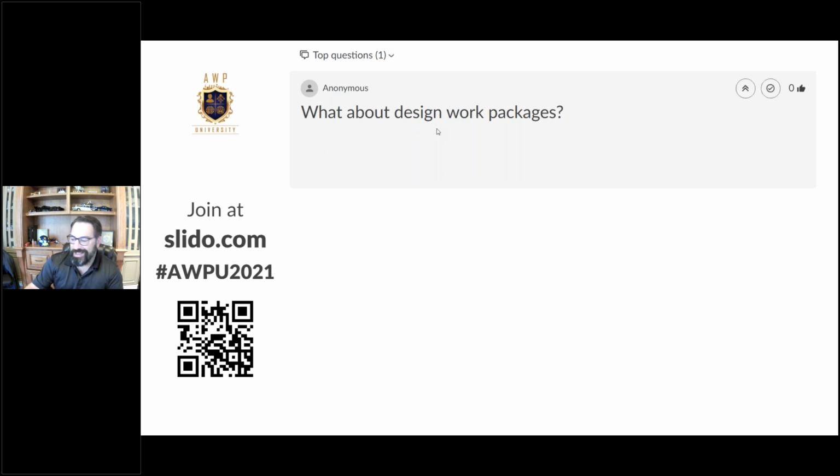So when we talk about design work packages, as far as in engineering, as to what designer is doing what grouping of work goes to an individual for engineering development, those would typically be rolled up and tied to the EWP deliverable, which is then obviously mated to its one or many CWPs and the web of influence to that CWP. Design work packages are not typically construction forward facing. At least in my experience, they typically fall into a basis of management of the actual engineering itself.